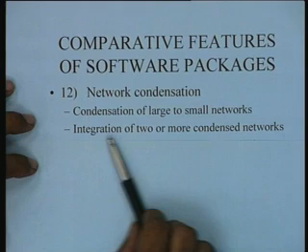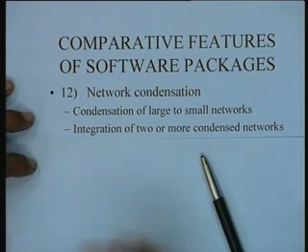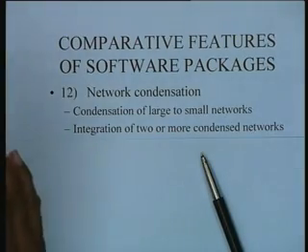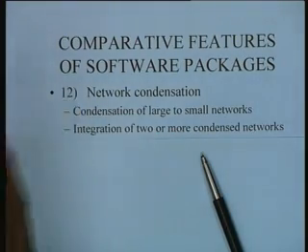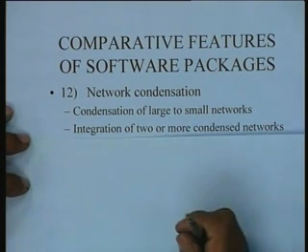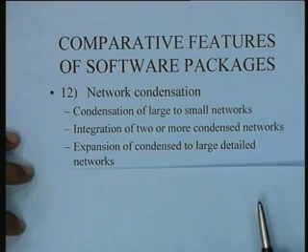It could be useful not only for condensation of large to small networks, but also for integration of 2 or more condensed networks. You could take a small portion of one network, a small portion of another network, put them together and make a new network out of that. That kind of facility is called network condensation essentially, and then the expansion of the condensed to a large detailed network,